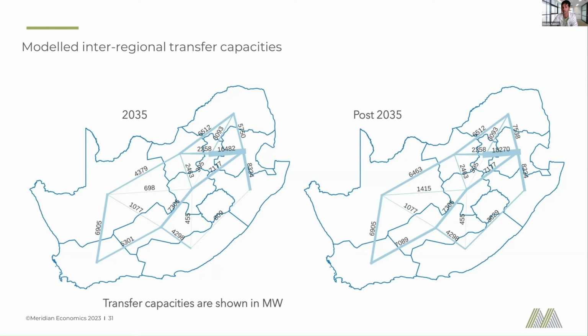But long term, we need long-term storage, and there's a place for batteries and pump storage. Now, because pump storage takes so long to build, if we need one in 10 years' time, we better start building now. Like in Guyana, it took 12 years to build. There were issues with it in that there were some deaths, so the construction stopped for a while. But they're long projects. They're risky. You don't know the capex when you take FID.